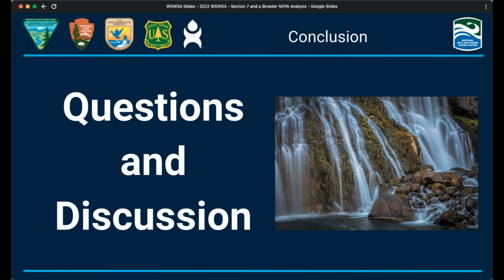Yeah, I definitely have seen designation happen after we've done NEPA on something for what was formerly an undesignated river, and those are new conditions that we have to analyze, and it does change things. We've also done projects in many places where we haven't checked the eligibility of streams, and we've done the NEPA, but we haven't checked and seen if a stream is eligible or suitable, and we've gone ahead and done a project, and we've knocked out what could have been a future wild and scenic stream.